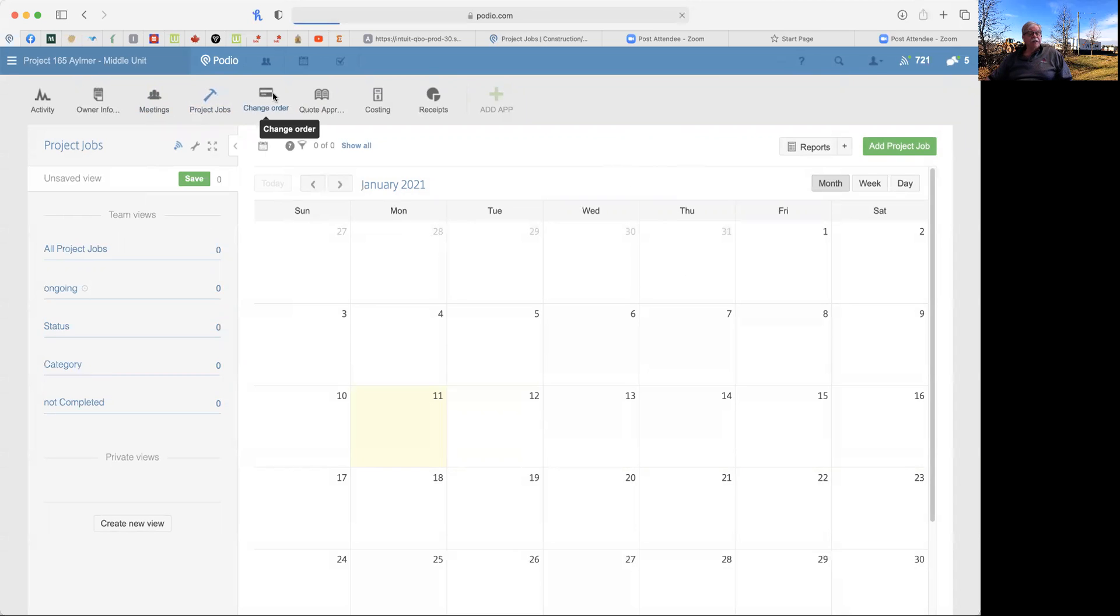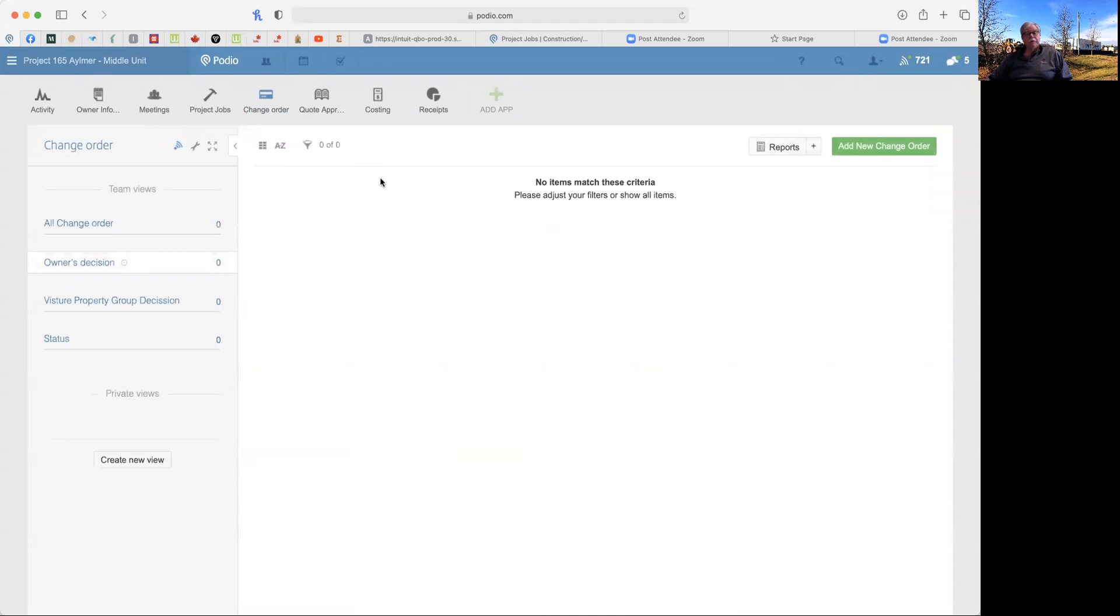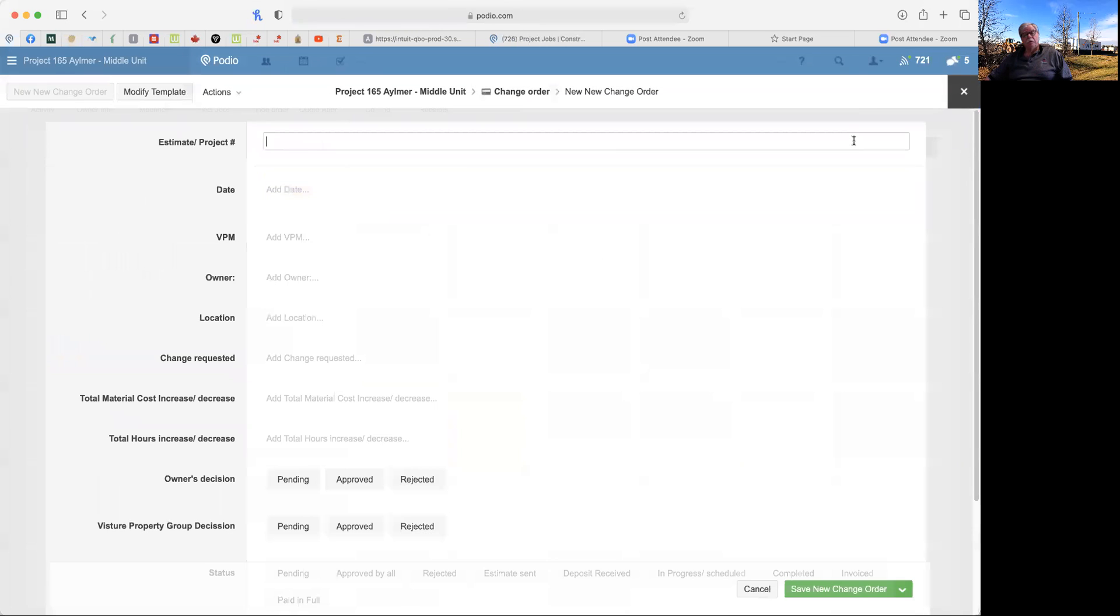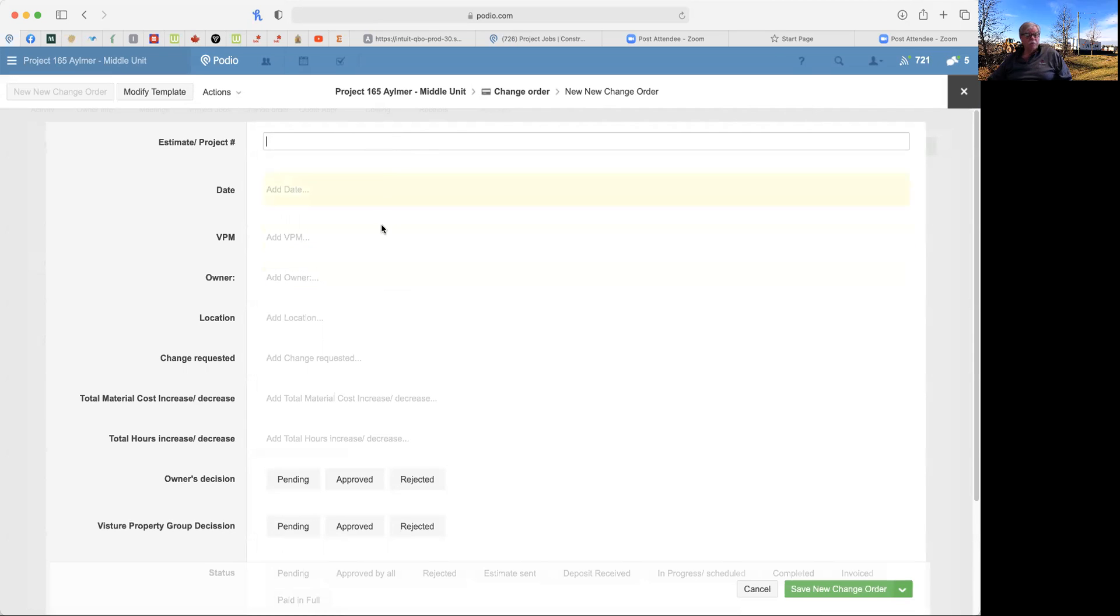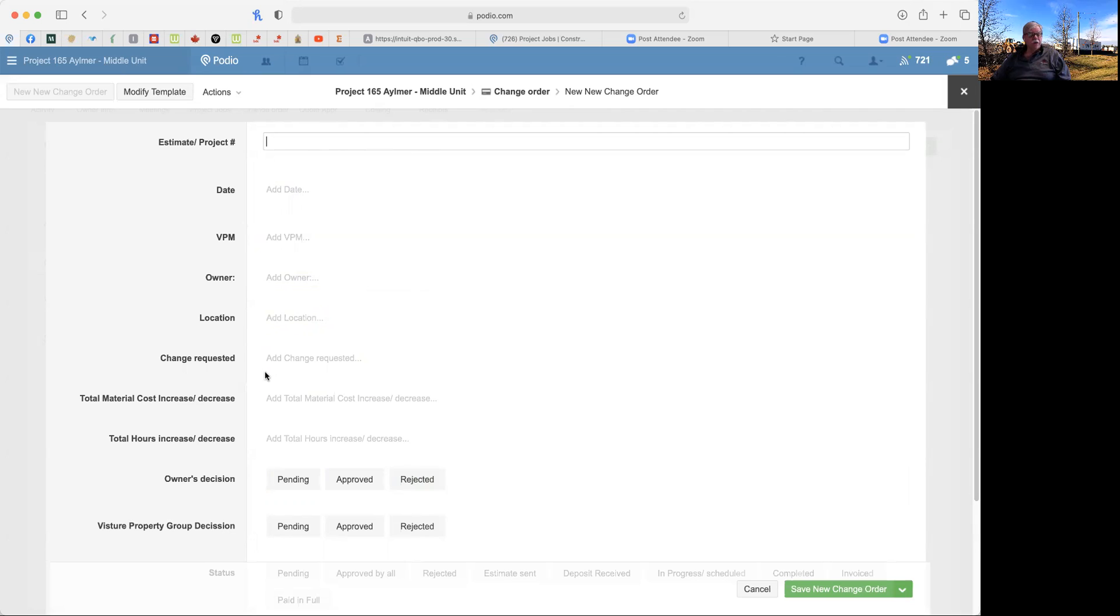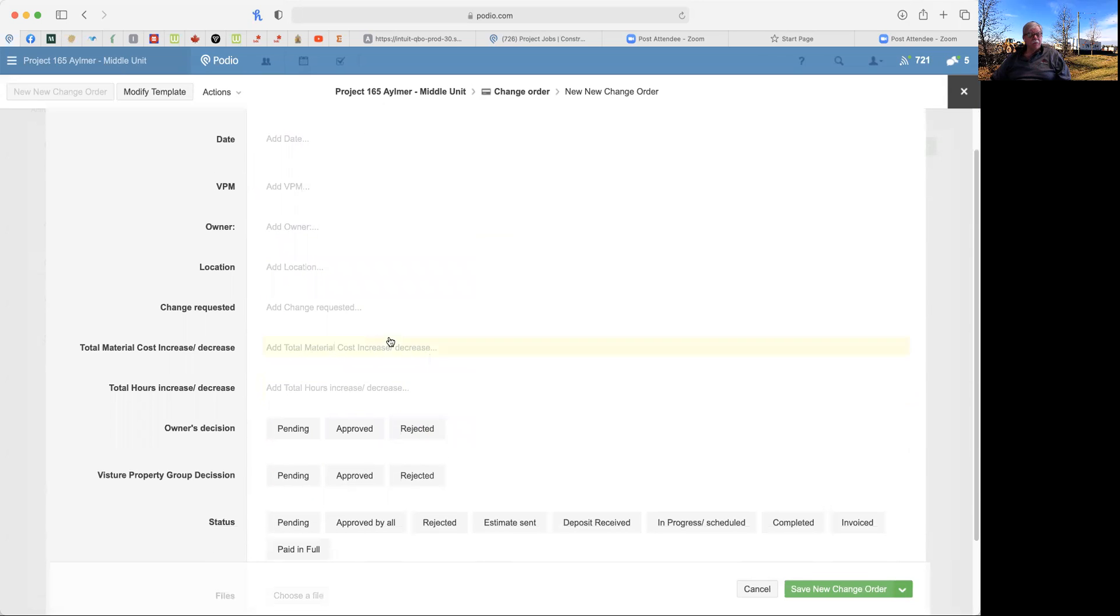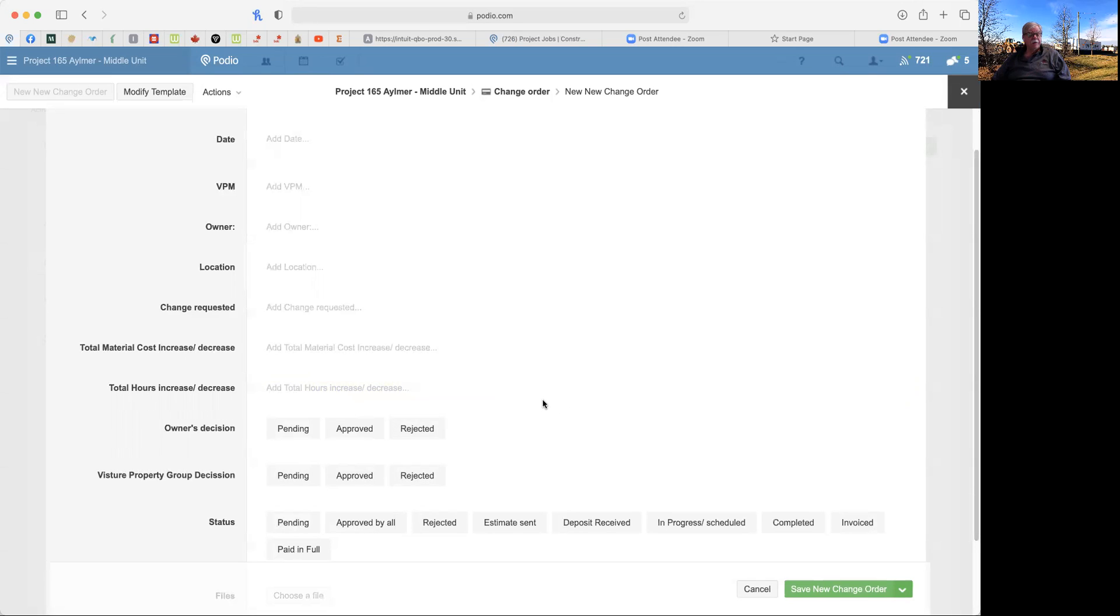The next tab will be a change order and sometimes the scope, quite often the scope of work when they go into it has a tendency to change as we go by. So we want to document this and we will be filling out these tabs to make sure who the owner is, what the location, what the change that's being requested, the material that's increased, especially the increased cost in the material, the increase, what it does to your timeline, the increased time it's going to take.